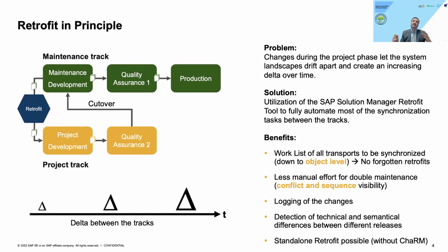In this way, you can keep the two systems aligned for the duration of the project and ensure business continuity at the go live. Additionally, in this process, you need to consider that for the cutover period, you need to have a configuration freeze from a certain point of time of the project to guarantee the success of the project and to minimize the risk of the project.